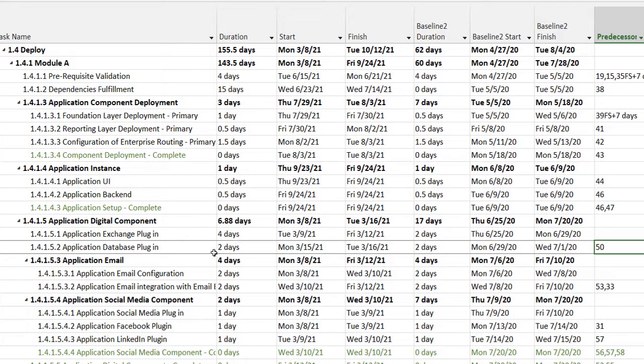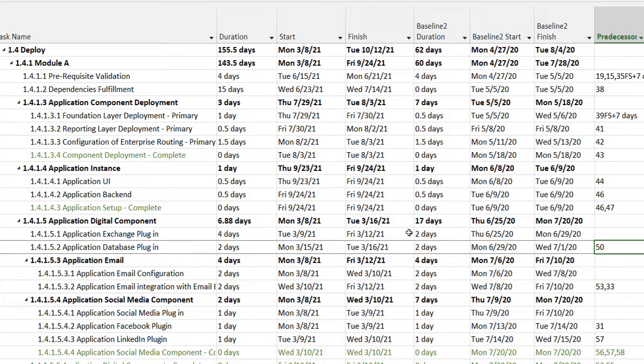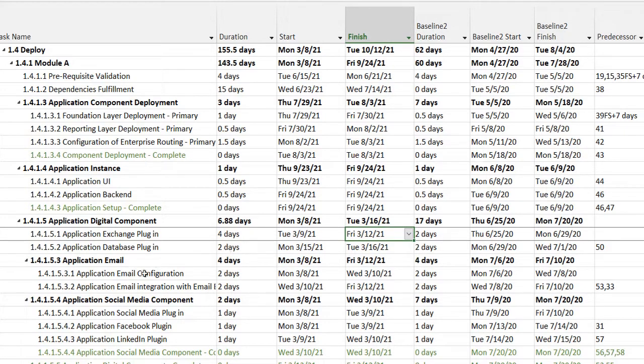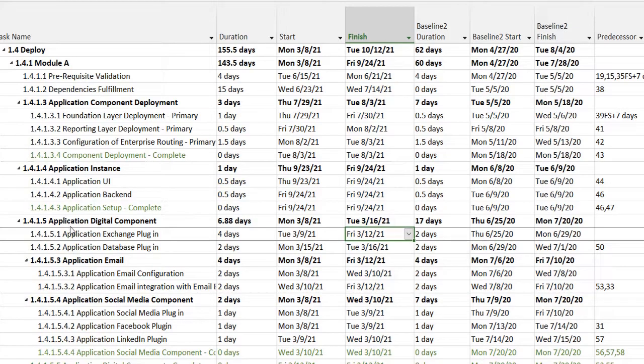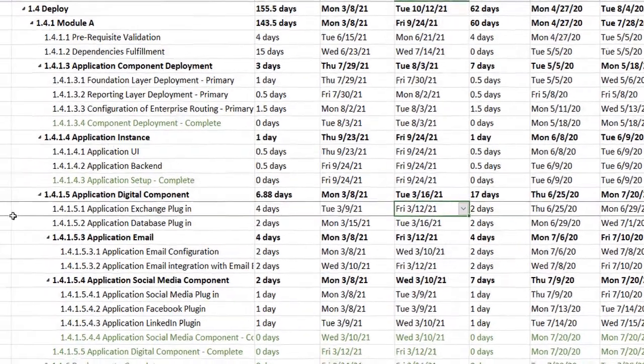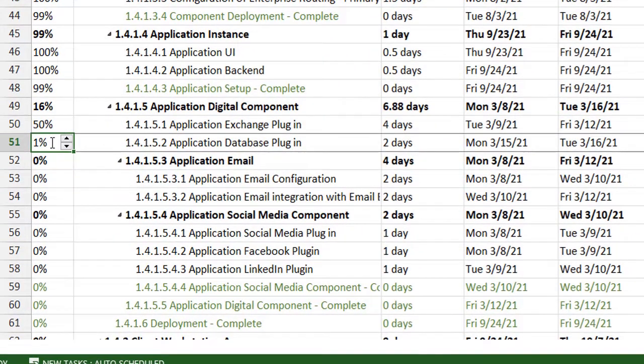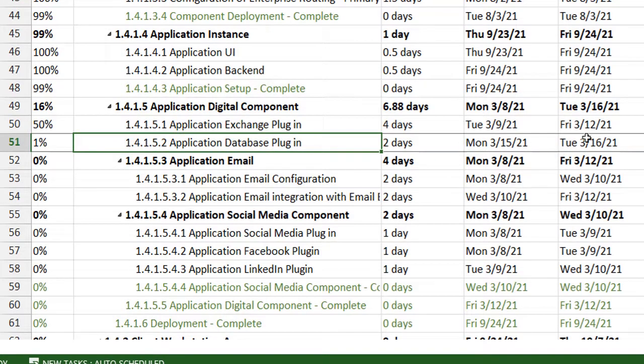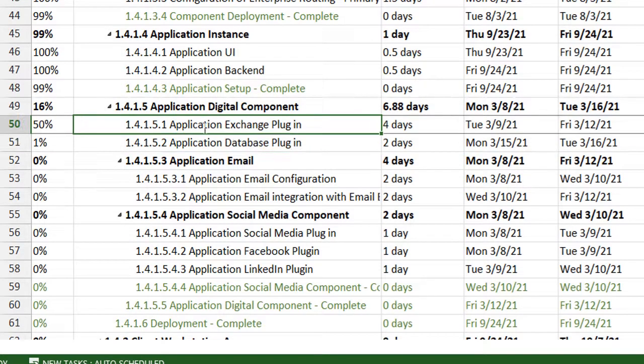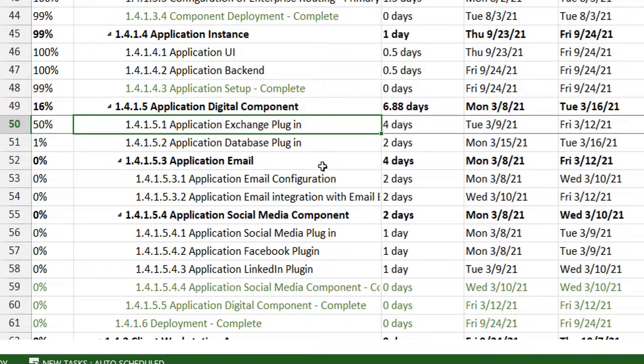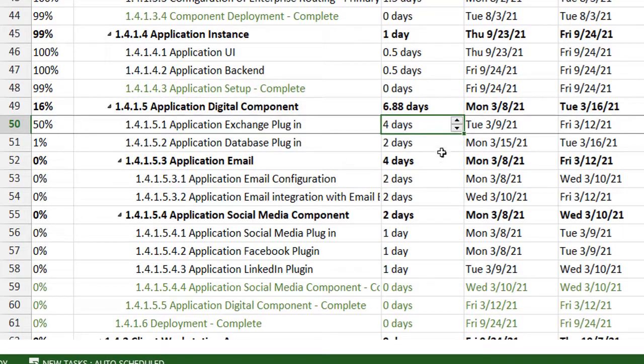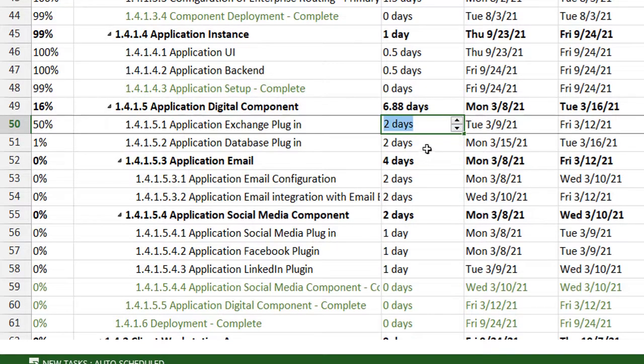So task 51 will start from the date task 50 finishes. You can see that both tasks have started, although they're dependent on each other, but some portion of task 51 has been started. However, let's say that due to my extra work, I was able to reduce this four days to two days. So let's say I reduce this to two days.